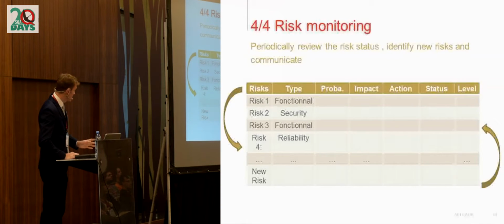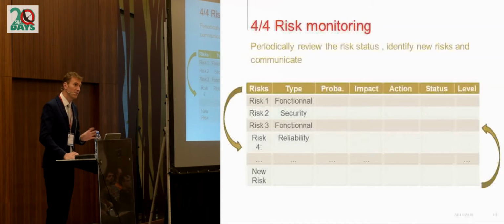Okay, and the last step of the normal process is to monitor the risk. It means to deliver reports based on the risks. How many risks do we have? And for each risk, what is the value of the updated impact? What is the value of the updated likelihood? Who is working on the risk? And so on. And that's actually very, very important.